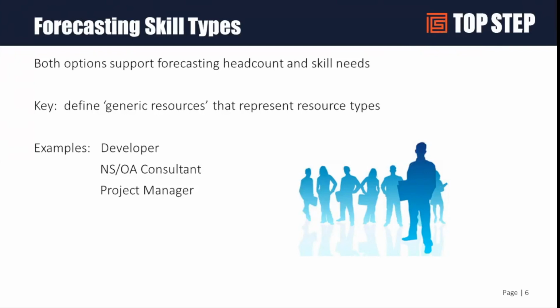It's not a real user. It's not a user account in the system. It's basically a name in the system that you set up. You can have as many generics as you want, but quite often you name it what kind of resource you need: developer, or maybe Java developer if you need something more detailed, project manager. We use NetSuite OpenAir consultant. Those are all generic, so that if I schedule that generic to a project, I know what kind